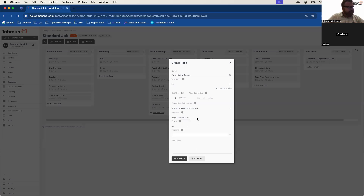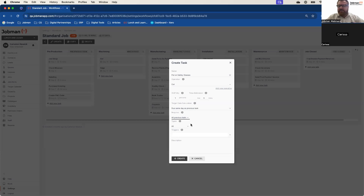In this particular case, we definitely want 'all previous tasks.' There is also an option for 'none' — if you have certain operations or tasks in the flow that are independent of everything but you still need them checked off, you can set a date to them manually without needing the automation of flow. A good example of this might be 'check measure' or 'confirm specs with client' — a task that can be done independently at virtually any point in the flow, but it's sort of critical because once you have that confirmation of detail, the rest of the manufacturing process can kick off.